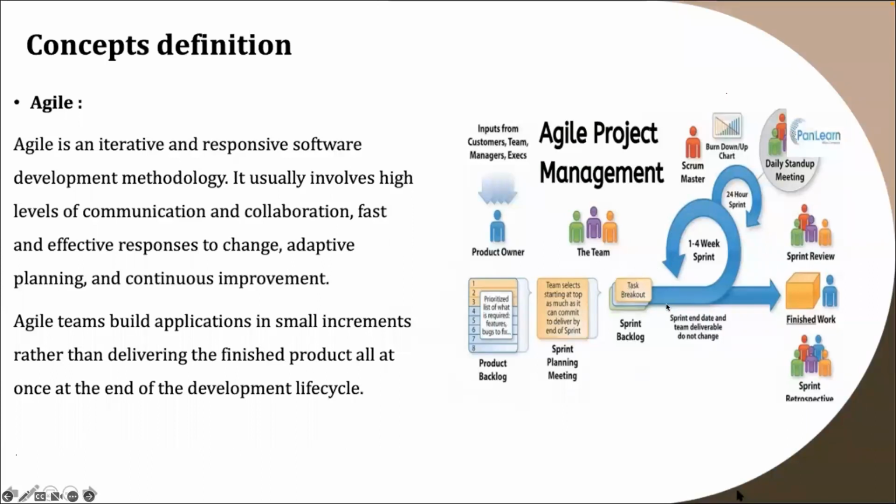Once it's done, you have what they call the sprint review. In the course of your sprint review, you talk about the products you deployed or delivered. Once you speak about that, you go into the sprint retrospective. Now, these are the different ceremonies, by the way, that are applicable to an agile environment. After the sprint review, you have the review with the stakeholders to demo. So you demo what you have actually worked on to say that, okay, in the course of the past 2 sprints, this is what we did.